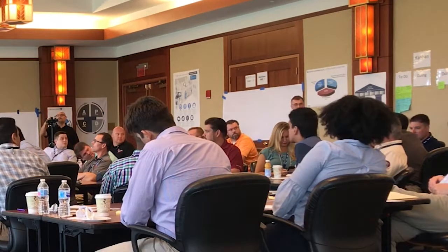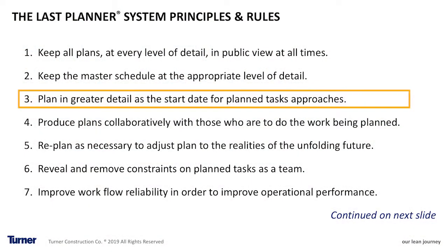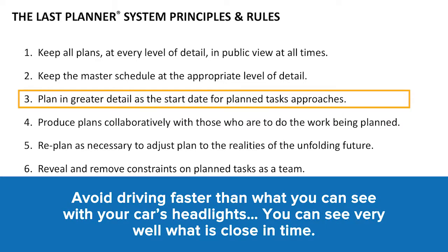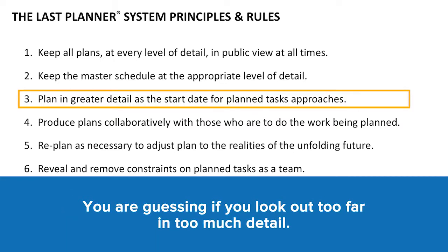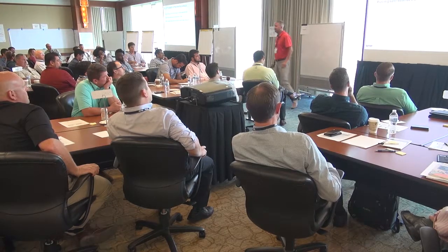Let's move on. I'm going to get into master planning. Number three, plan in greater detail as the start date for a planned task approaches. So only plan in great detail as far as your headlights can see.